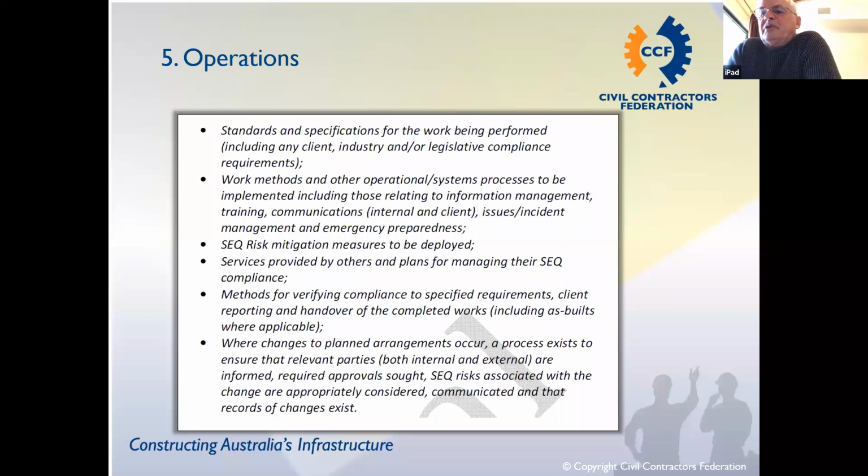Verifying compliance of specified requirements. Yes, clients' reports, handovers, your test results and all that other stuff, ITP plans, as-built. Sometimes you might have to do camera verification if you've got to provide, on subdivisions, certain activities, as-built drawings and so on. Operating manuals. Where changes to plan arrangements occur, and they will occur, there will be variations. How you're going to manage that, and you can see that. That's another risk. And one of your risk registers should identify that when things change on site, how are we going to manage that? Next one, thanks.